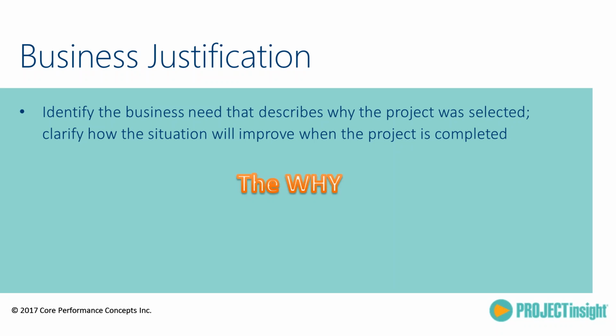Okay, so I was kind of cautioning about statements of work, and it depends on where the variation is, but definitely the documents have to be aligned. We're going to talk about how to keep them aligned and change control. The source could be lack of alignment through change control for the two documents. And the advantage of having a charter connected with or inserted in the statement of work is that when the statement of work gets updated, the charter, which is either an attachment to it or in the body of the statement of work, would automatically, one would hope, get updated at the same time.